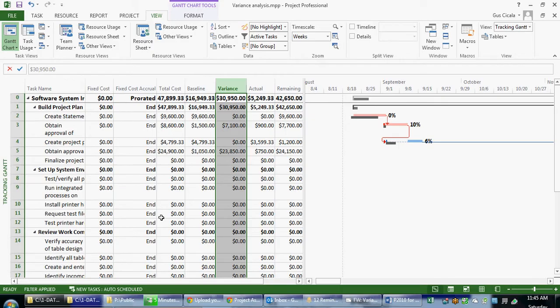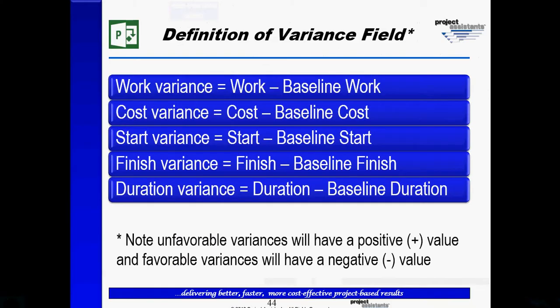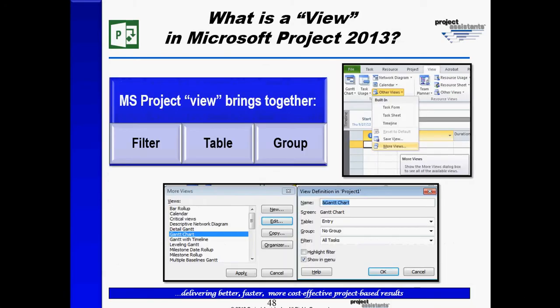You may also recall that we have discussed the idea of a view which brings together a filter, a table, and a group. If we want to zero in on unfavorable cost variances, we could apply something like cost over budget filter.